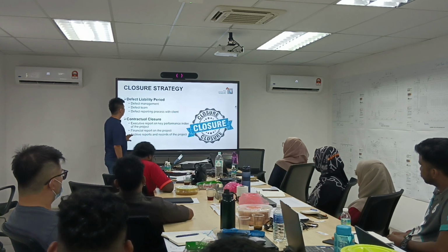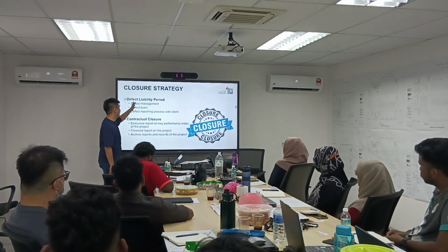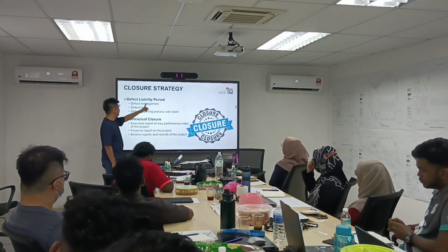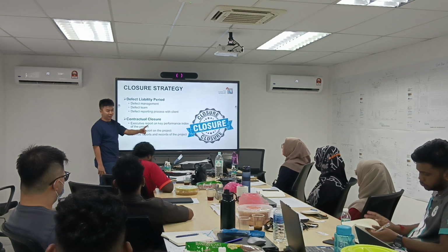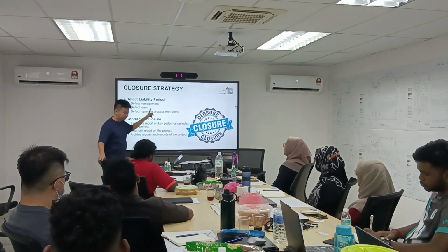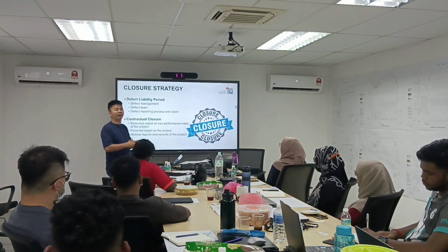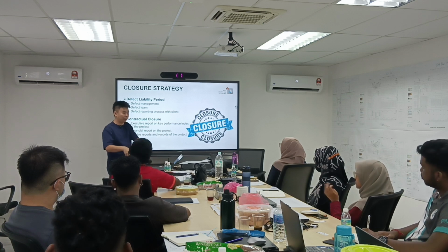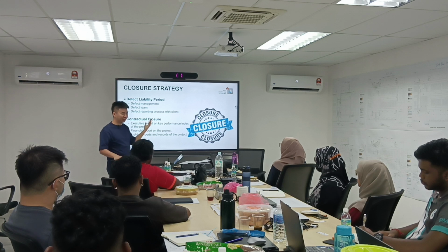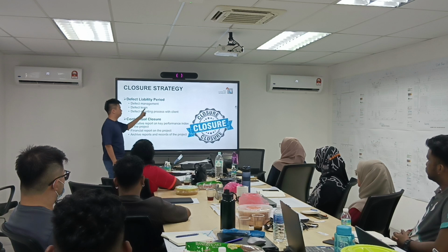Yeah. So after all this is done, you will officially enter into a DLP period. Okay, so we call it DLP. Once you enter into DLP, what does that mean? Yes, warranty starts. So when you go to DLP, you will not want to have all your engineers of that project in that project. Because crazy, right? You cannot spend 60 engineers just to do a finished project. Doesn't make sense. So when the DLP starts, we need to form a defect team.